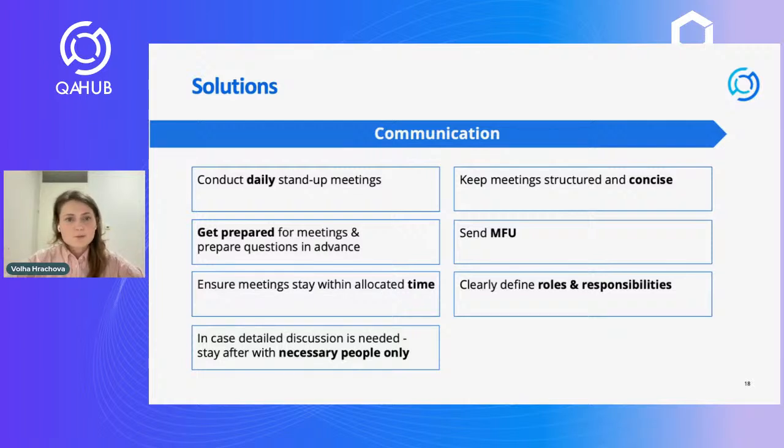In order to avoid miscommunication, I would suggest having daily meetings, but they should be within the allocated time frame. So let's say for daily stand-ups, we have 15 minutes, and within this time we just need to briefly provide our status. And in case some detailed discussion is needed, just stay after the call, only with the necessary people, and discuss what's needed. No need to waste all team members' time